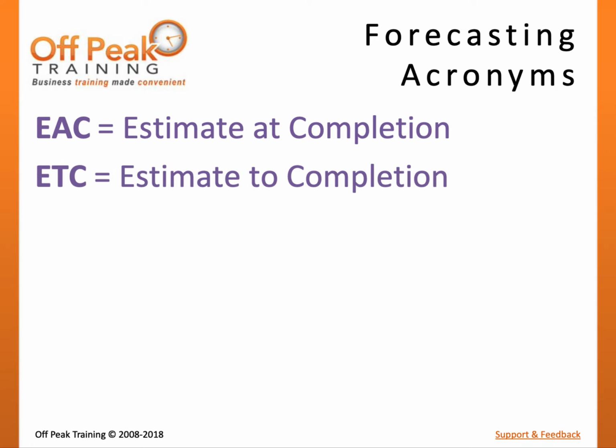ETC stands for Estimate to Completion, representing how much money we believe the remaining project work will cost. In theory, we hope this number is close to the remaining budget. However, as variances become present in the project work, the estimate to completion will change. The idea is to understand how much money is required to finish the project work.